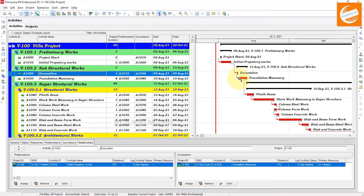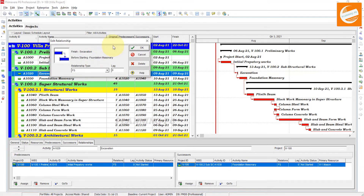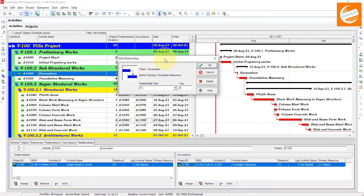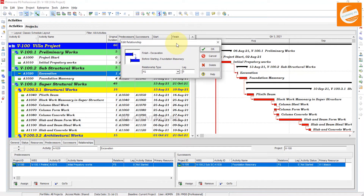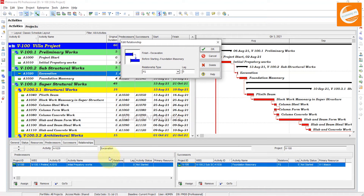If you want to remove a relationship, double-click on it and this dialog tab will appear. Here you can see: 'Finish Excavation before starting Foundation Masonry' — this is a Finish to Start relationship. You can remove this relationship from here.